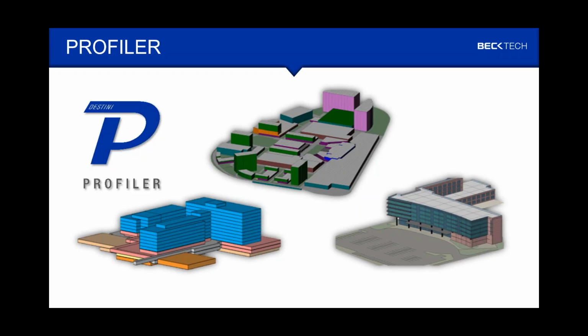So we're not proposing a pink building, but what we are using is the colors to convey our assumptions around mixes of materials. So the pink may be 60% glass, 40% brick. The green may be 80-20. The blue may be 100% glass. But it enables us, again, to point at things and have very specific conversations around assumptions.